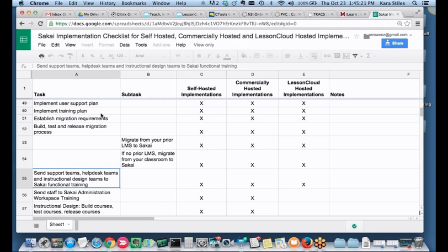So these instructors who had never been through eCollege training, who had only been using Blackboard for their courses, logged into eCollege a week before classes started, went to their courses, and said, what in the heck is this? They were so upset about the way that the new system had been implemented, in terms of, I guess I would call it, lack of communication and lack of training, that they ended up dumping eCollege just a couple of years later, because the instructors never really got over how that system was implemented and communicated to the people who were going to be using it.